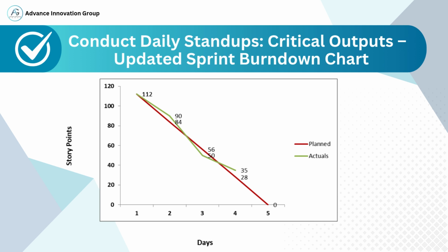The chart enables teams to compare actual performance with the planned trajectory, identify delays, accelerations, or risks early, and ensure transparency and alignment in daily stand-ups. This updated sprint burn-down chart highlights the team's progress and helps ensure that everyone is working towards the sprint objectives